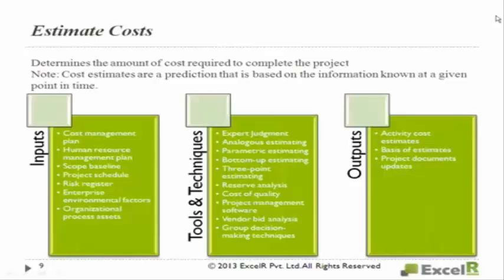And they take that rate. For example, 7% is the inflation rate. Every year 7% rate increase is happening in our country on an average. Let us say that 7%. So today it's 100 rupees. After 4 years, 7% of 100 is 107. 7% of 107 is how much? 7% of say 114 is how much? So they will factor that and then they will take that rate if the project is long duration. At the time of purchase, that time you are going to purchase. So it depends, depending upon the duration of the project.